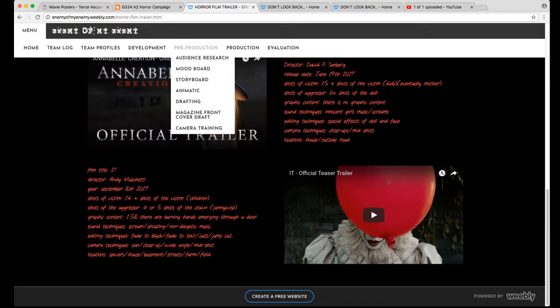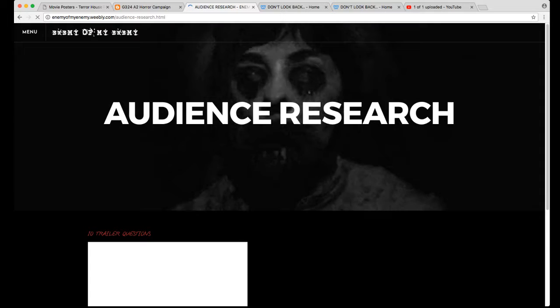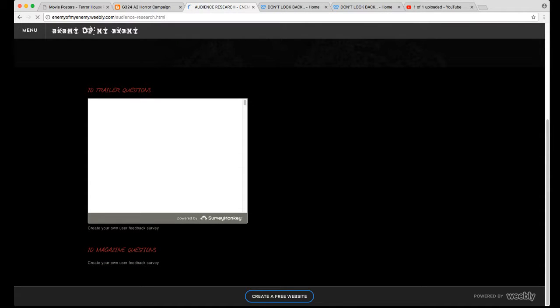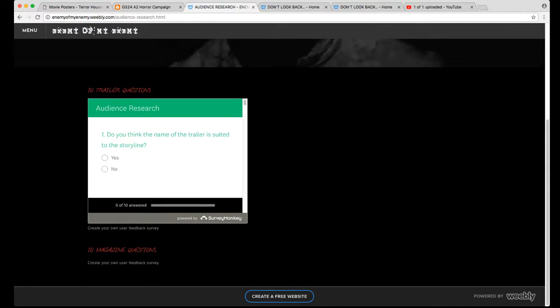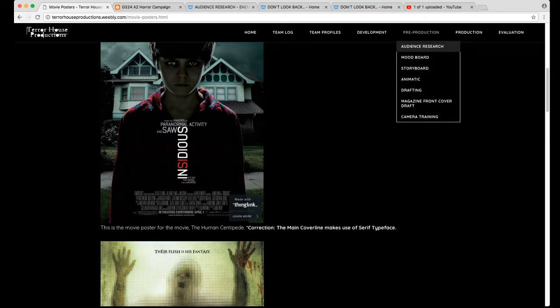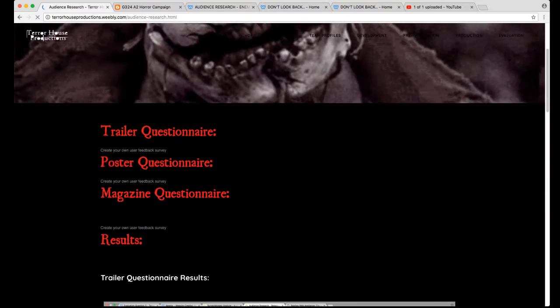Second section is pre-production, so I'm just going to look at where you're at the moment. It should be 75% complete. Okay, so we don't have any magazine questions on here or poster questions. We don't have any results, and we don't have any results analysis. So if we just have a quick look through, that says to me that we're behind schedule quite significantly.